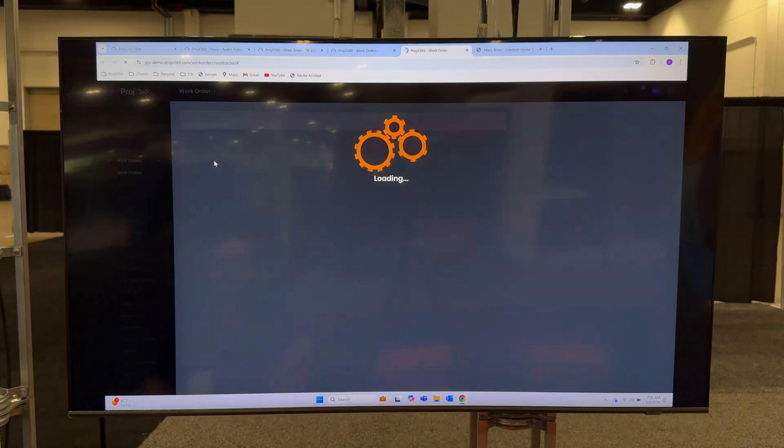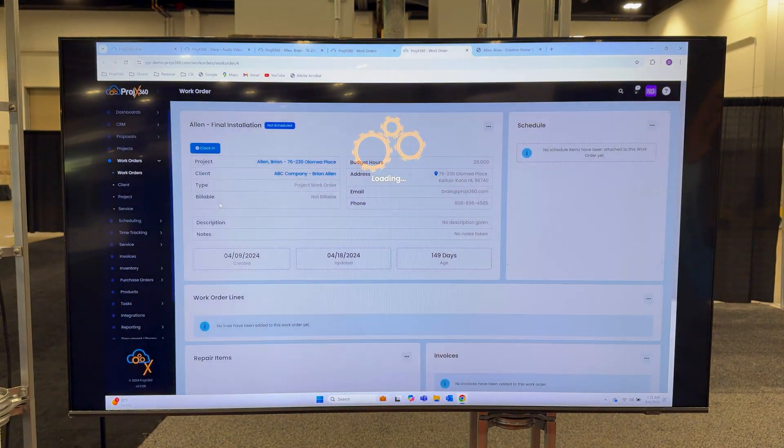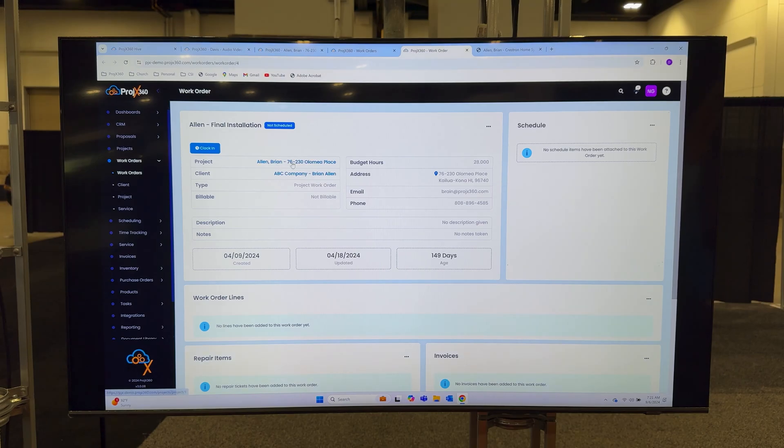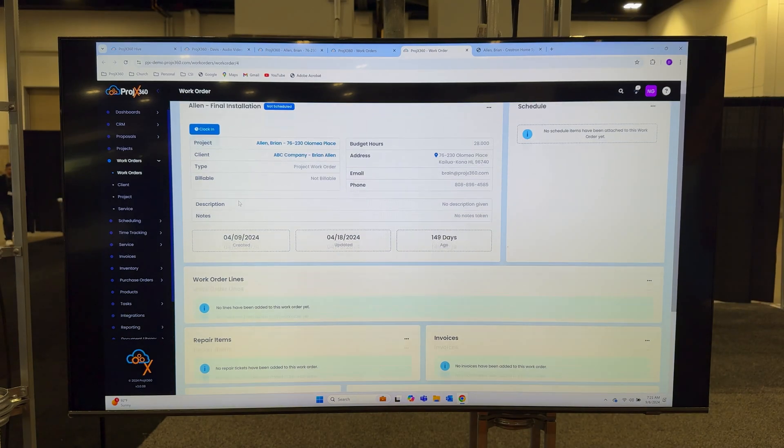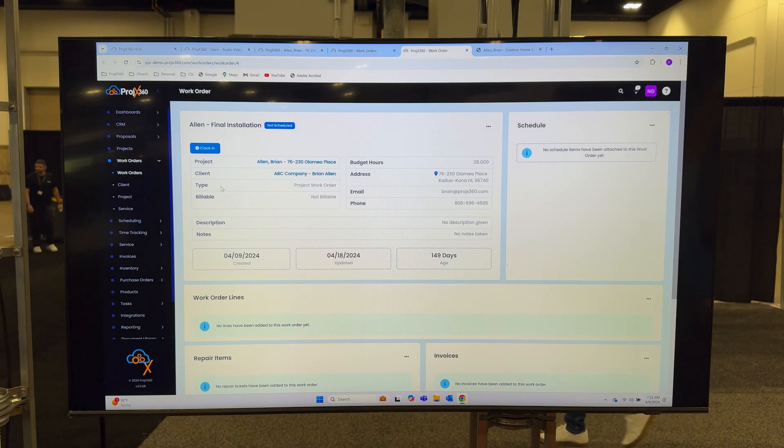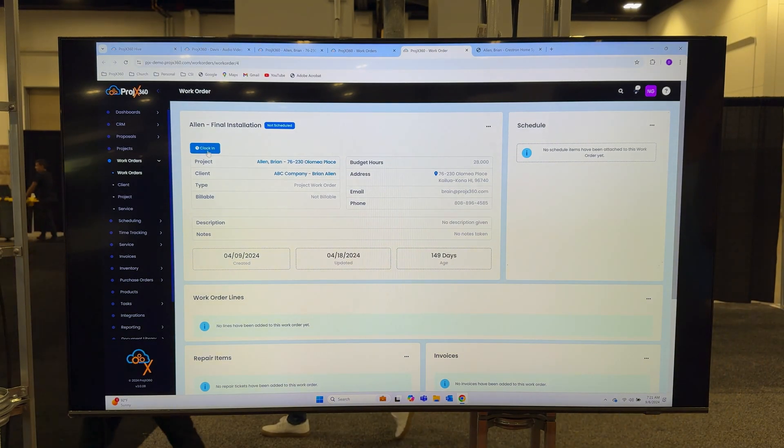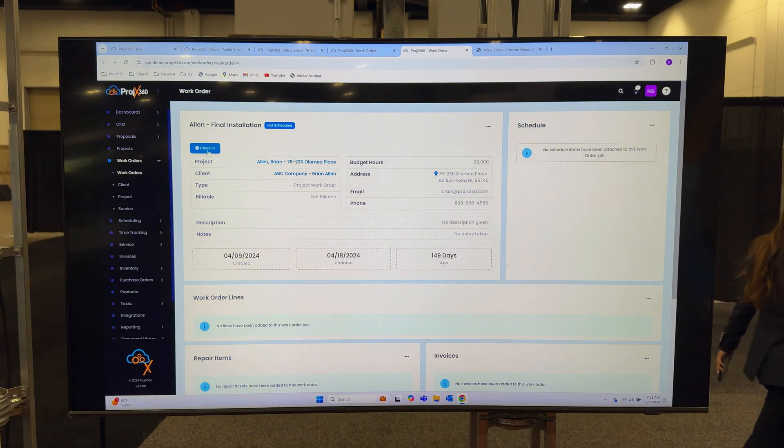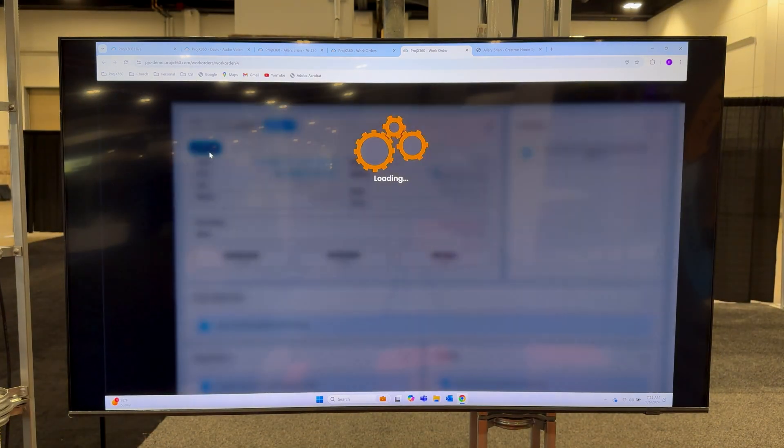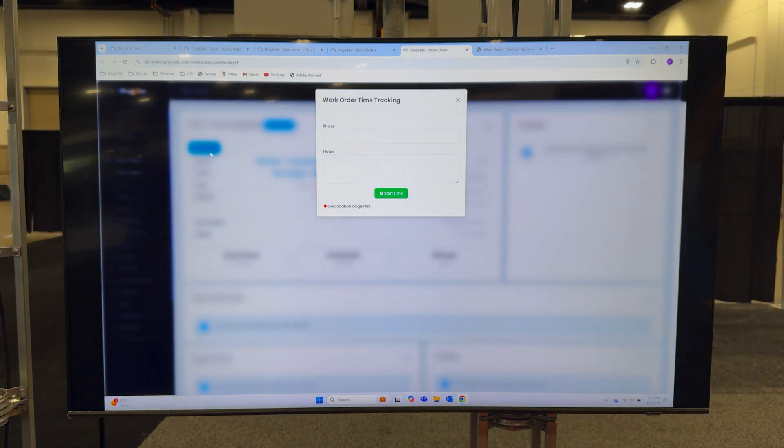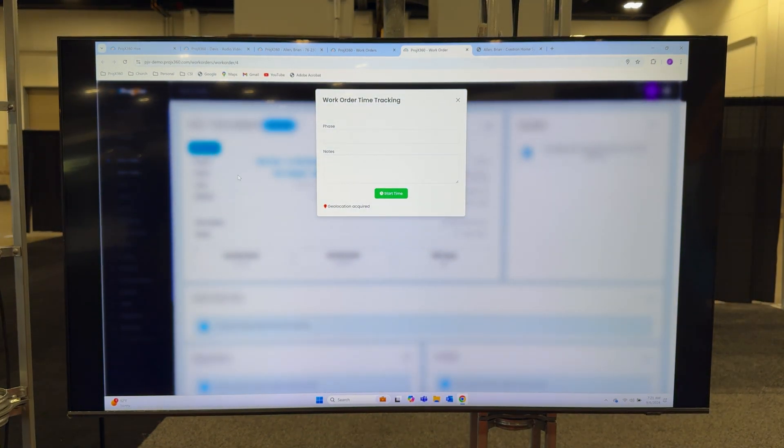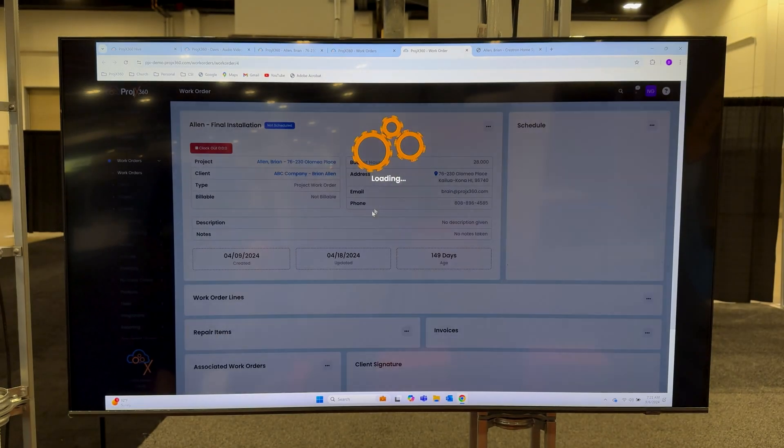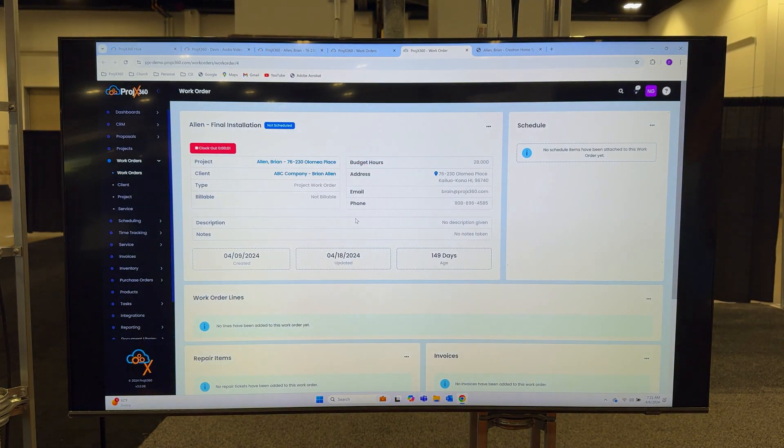When you go inside of a work order, you can see what type it is, is it project or service, you can give it a title, you can put hours to it. There is a clock-in button right here for your technicians. When your technicians hit the clock-in button, it already knows the project and the work order they're on. All they have to do is grab the phase they're working on and hit start time, and now they're tracking time against the project, work order, and the phase, and they have a live running clock.